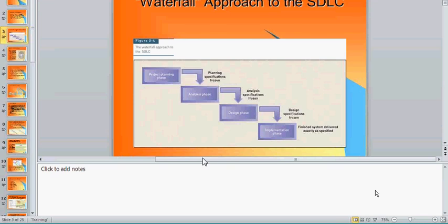Once we do the staffing, we are finally ready for the project to launch. So we have a proper plan here for the project. We have a business case, and we document it and show the document to the stakeholders for their approval. Once the stakeholders have approved our plan, we finally launch the project, and that is how we go about the initiation phase. Very nice. Everyone clear? Okay, Nehal, you can mute yourself.